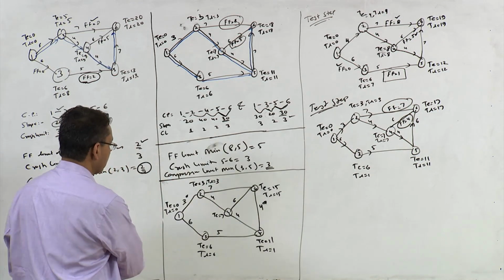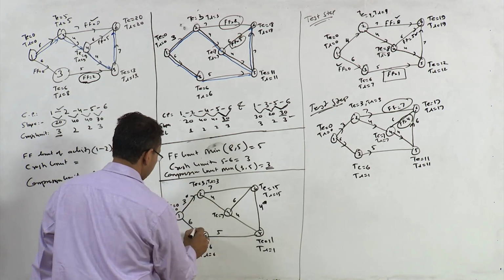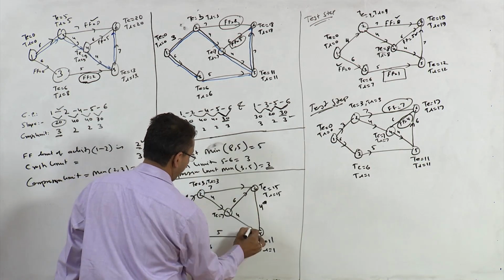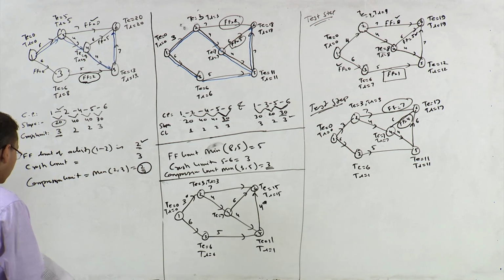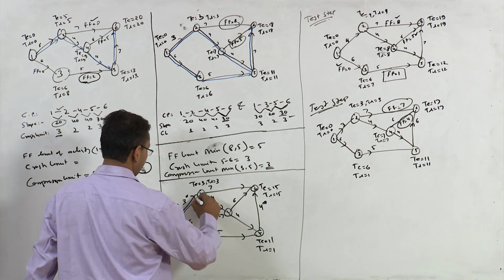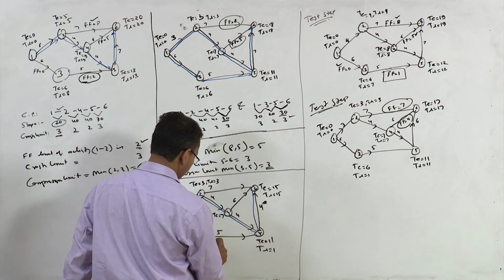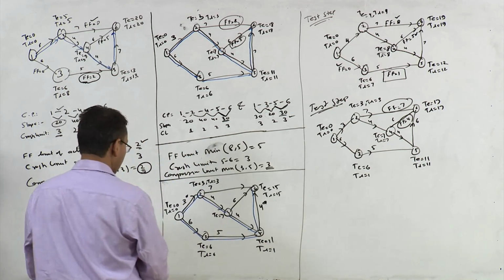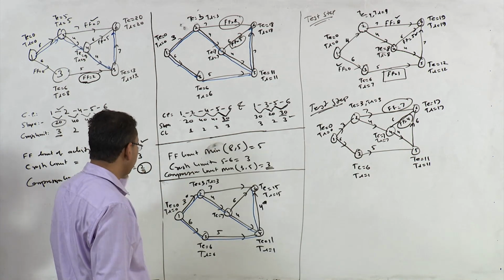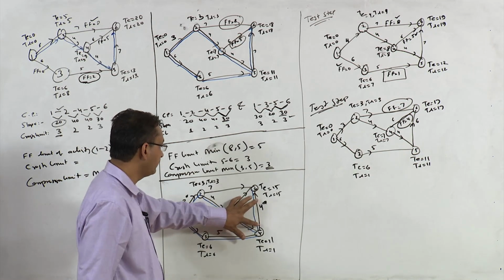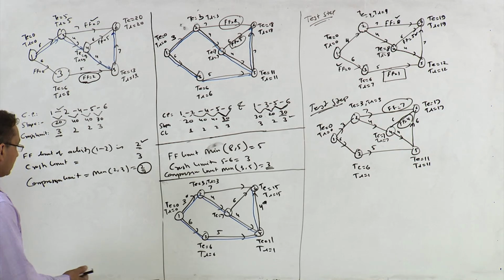You can in fact do the reverse calculation, right? So all these activities are in this direction, so T is 15. And the critical paths are, this is your critical path. So again you have got two critical paths. So now this is your network, and you have reduced activity 1, 2 and 5, 6 to their fullest level. Now what?